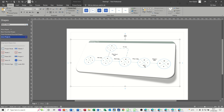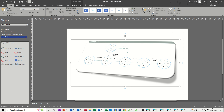In this example, this is the critical path, because this task — prep cups — can happen any time during this five-minute period. It's got a float of four minutes, so it can happen any time. This dotted line just represents a dummy line to get back into the main float.